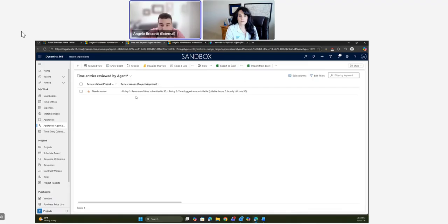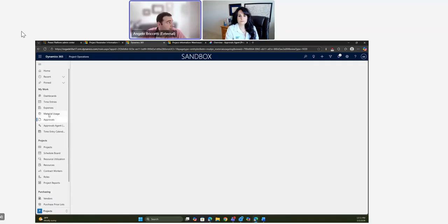The reason it was classified as needs review is because the revenue of time submitted is 0 and the time was logged as non-billable. Both of those are because, as I mentioned before, I don't have a contract set up on this project. If I had set up the contract, it would then have that sales price and that sales amount and be marked as ready for approval, unless, of course, there was a different mistake. So overall, the agent itself is fairly straightforward in the way it interacts. Let's go ahead and do a quick example of material usage.